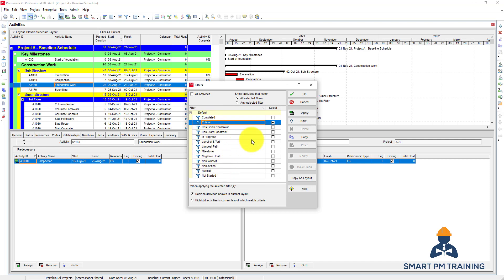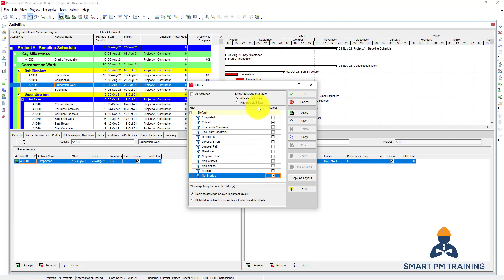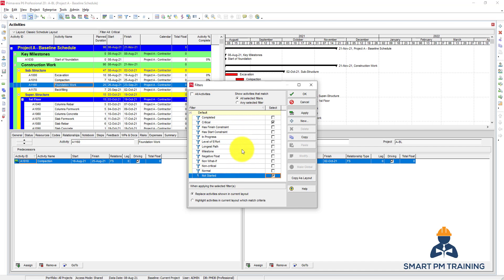In Primavera P6, say for example I want to filter Critical and Not Started. You also have the option to show activities that match any selected filter or all selected filters. In this case, Primavera will show me all activities that are critical and also not started.